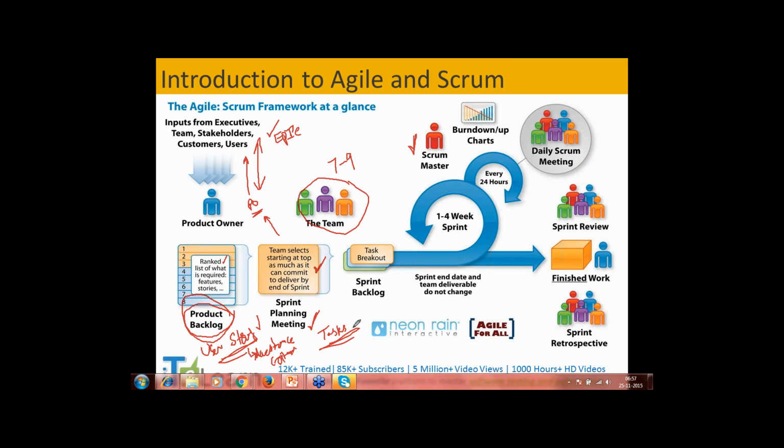Now, once you have the detailed tasks created, we'll assign them to individual members. Suppose for a simple user story, we have created about 100 tasks. I also worked as a Scrum Master, and I'm currently working as a Scrum Master. My experience is to go into detailed tasks as much as possible. At least the task should be detailed in such a way that it can be completed in a single day. Single day means 6 to 8 hours, what we generally estimate for every individual. In my case, we estimate 6 hours for every individual.